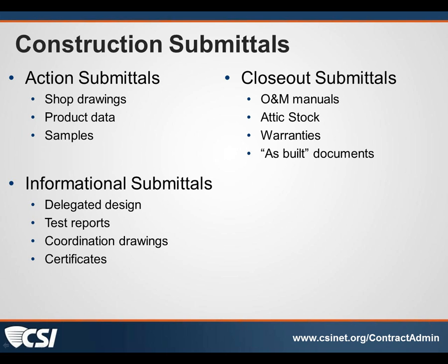And then we've got the warranties that obviously are critical for start dates, to be precise, to be sure that they're tied to the actual dates and not just sent in with a start date from when the submittal was made or put together. And the attic stock is something we've touched on that is also part of what we're doing in our projects. I would just caution you again to think about what you're doing for your particular client.